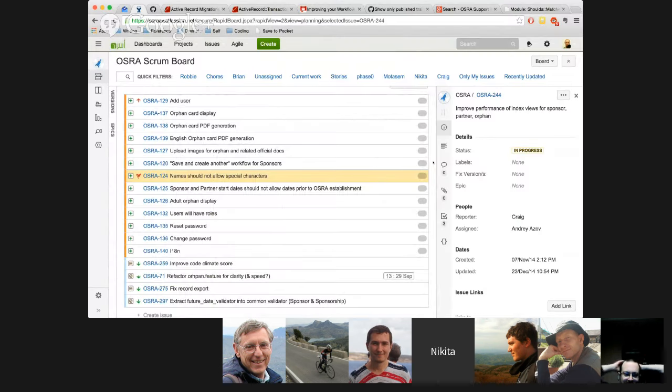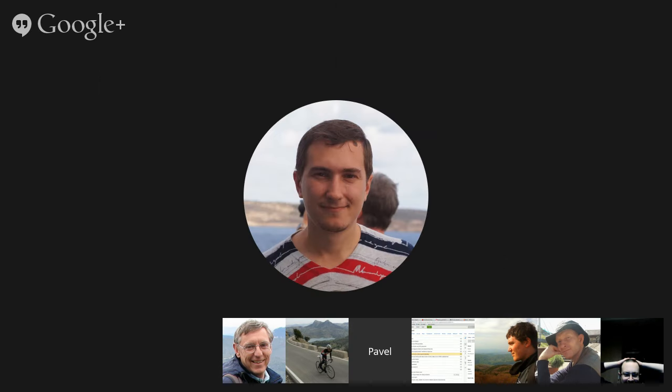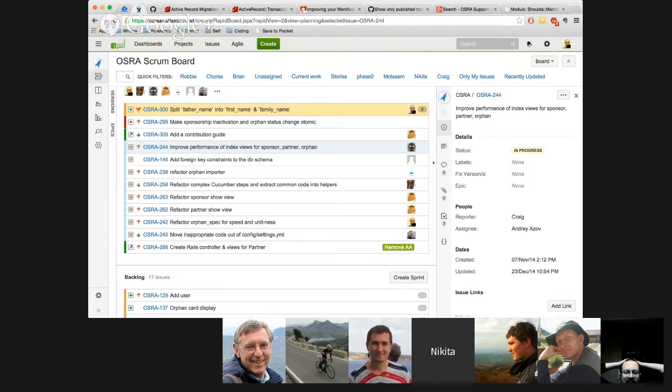No, guys. No. Why not? Because we have a lot of tasks in our current planned sprint, and first we need to finish them before we take stories from the backlog. So we need to understand if we're able to finish them, and what we should do if someone doesn't have enough time to finish these stories in the sprint. Maybe he should give that story or task to another one. And only after we finish all of them, we can take new ones.